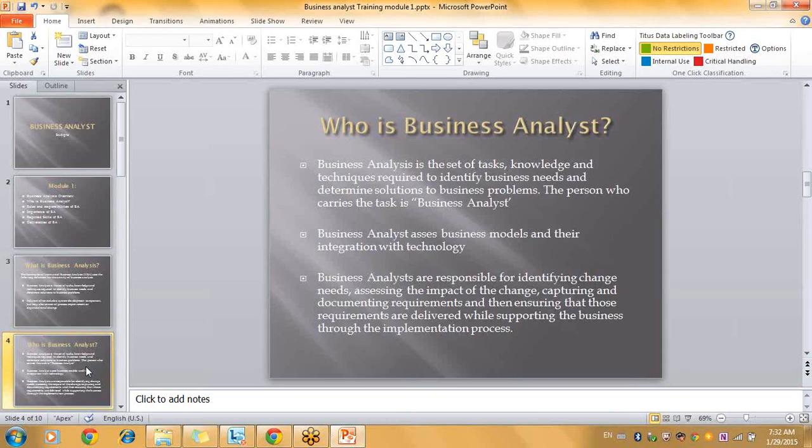From the question we asked just now to your business, I cannot go and change it because it is user specific or some region wanted. If any request comes from a particular region, then we will be changing the format only for the users from that particular region. If not, globally, yes, we can change it just like that, right? Now, the next thing, we have to go to IT. Once we are done with the clarification from the business, you should go to IT and say, hey, I need to change the format of this.